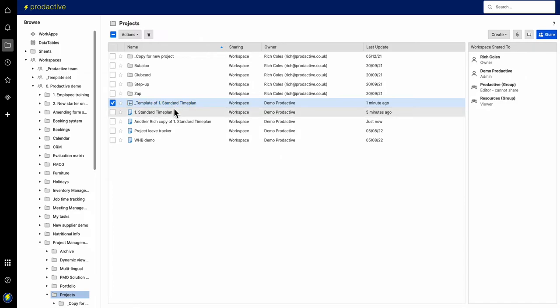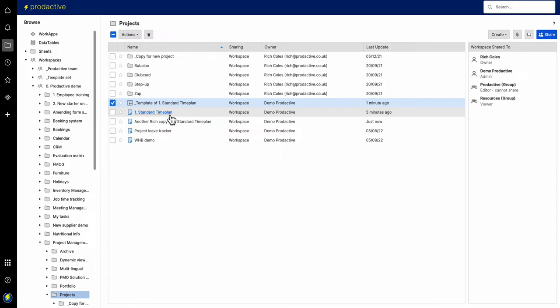Now what if you want to edit that time plan? Well the way to do that actually is then go back to a working version that's got the last version you want. You cannot go in and edit a template per se.